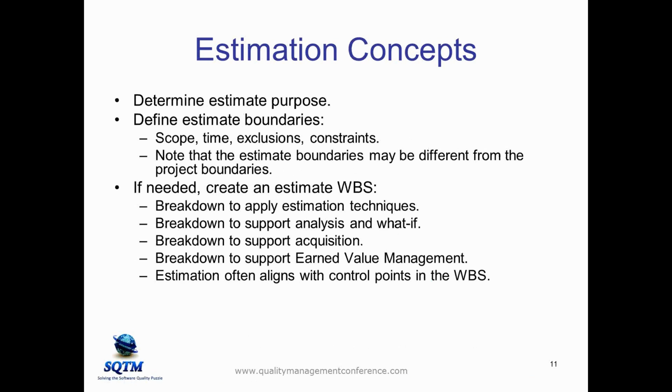All right, so when we're doing the estimate, what we want to do is, number one, start by determining the estimate purpose. Are we estimating this to do a trade-off? Are we estimating this to help with an acquisition? Are we estimating this to help with a budget? Because understanding the purpose of the estimate will often guide some of the decisions that you're making in terms of how you attack the problem, how you structure the results, etc.